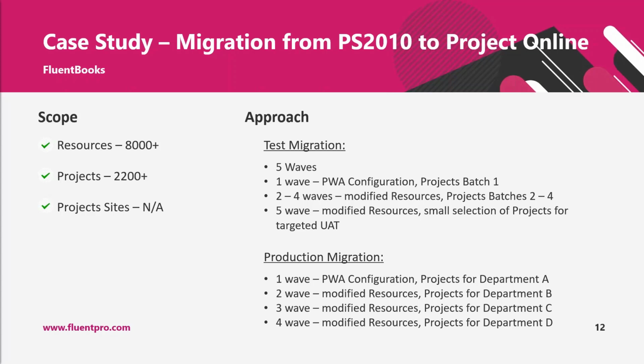Splitting projects by departments and migrating them in these batches allowed us to freeze the source environment for only 2 days in addition to weekends, and users whose projects were still in Project Server 2010 were able to continue working with their projects and timesheets in the PWA after this short period of freeze.